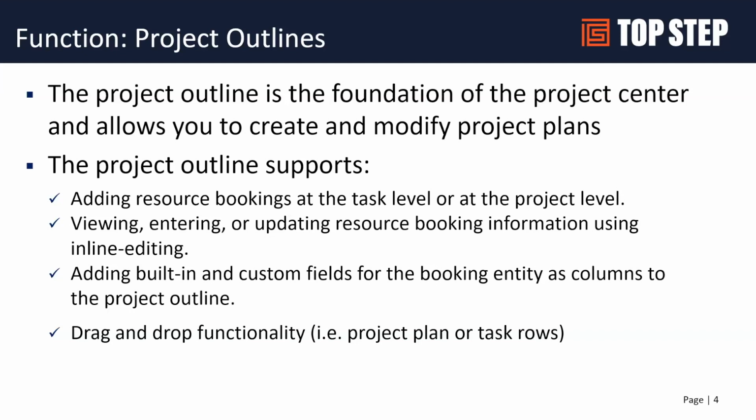Turning the Project Center on allows you to update resource booking information using inline editing from within the project. So if project managers are allowed to make those types of changes, this would be a way to give them that permission without having to leave their project or their project plan. You can then add both booking and task and project fields into your view, and they'll become inline editable.